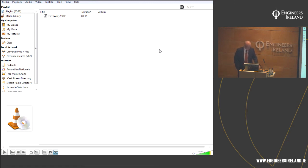Yeah, terribly difficult. And not only because to make it comply with building regs, but there's a contractual obligation there to provide a 75-year design life. And this threw up a couple of interesting issues. For instance, window opes in the external wall, if they're existing opes, they have timber lintels on them. Now, there's no way in the world we can say that a timber lintel is going to survive 75 years in an external wall.